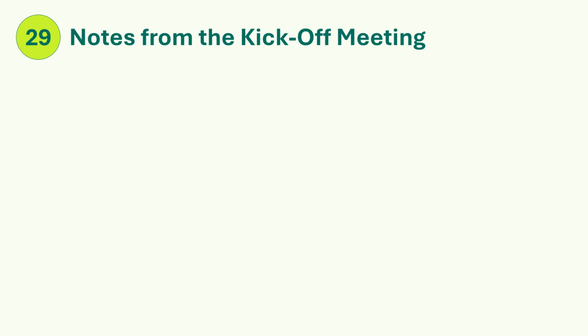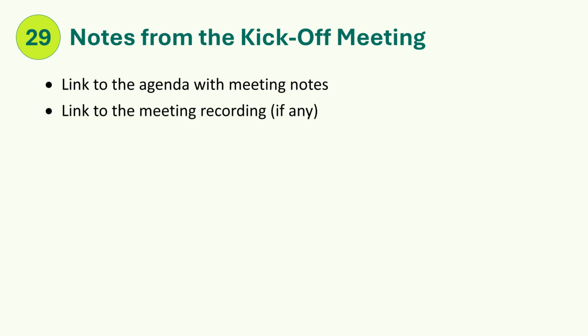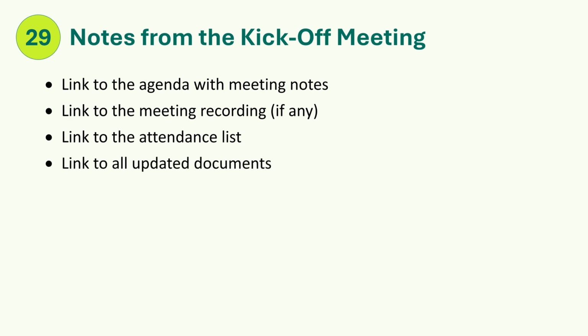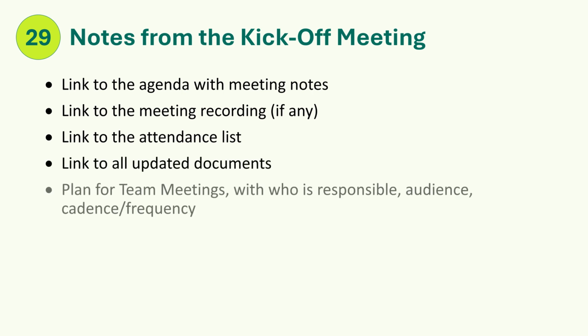Step 29. Notes from the kickoff meeting. After the kickoff meeting, you should email to all attendees and those invited but could not attend. Link to the agenda with meeting notes filed on SharePoint. Link to the meeting recording, if any. Link to the attendance list. Link to all updated documents.